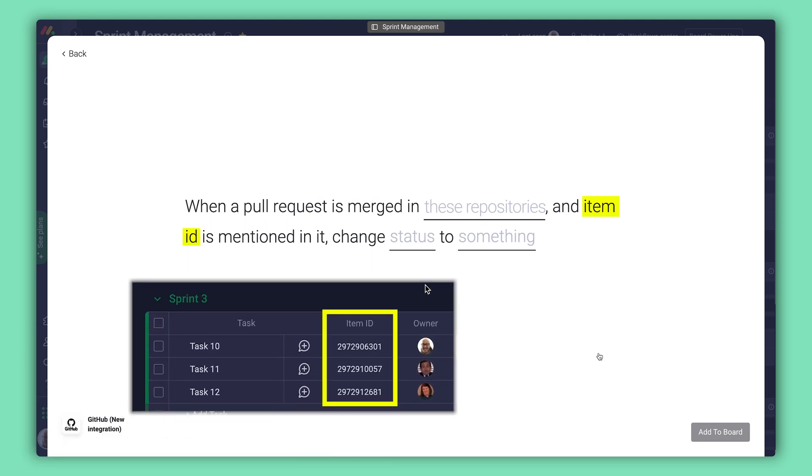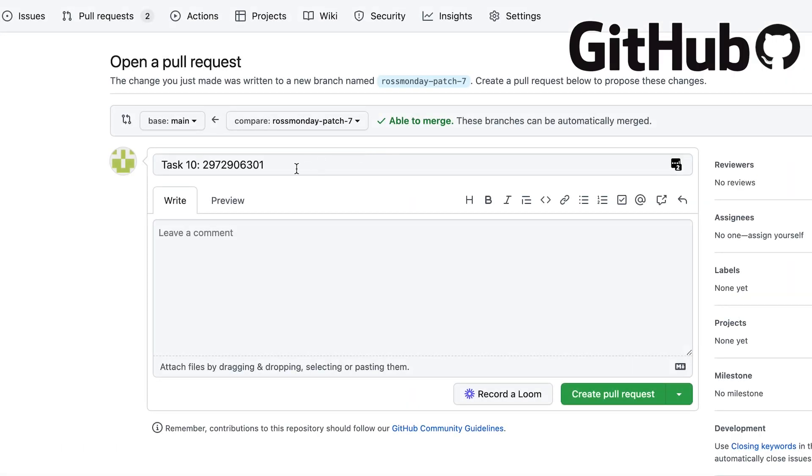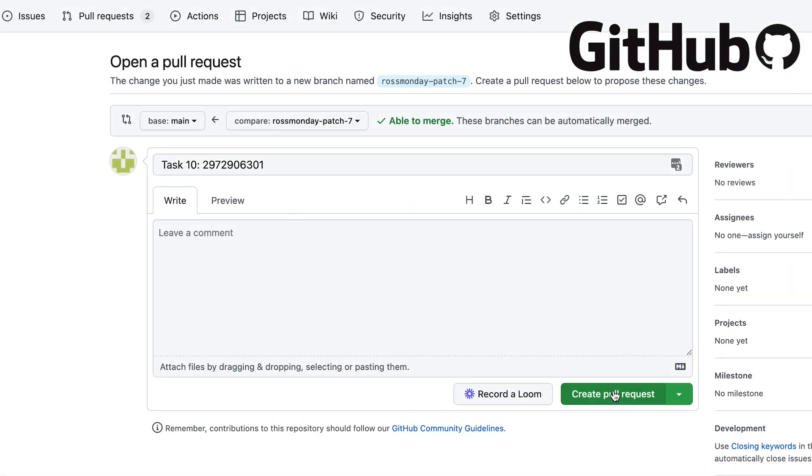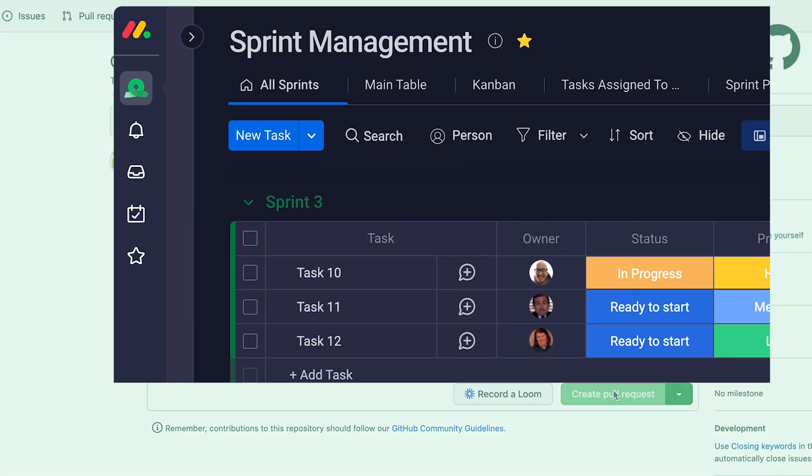By including this task's item ID into your GitHub commit, you can change status labels on your sprint management board, and trigger notifications for the task owners.